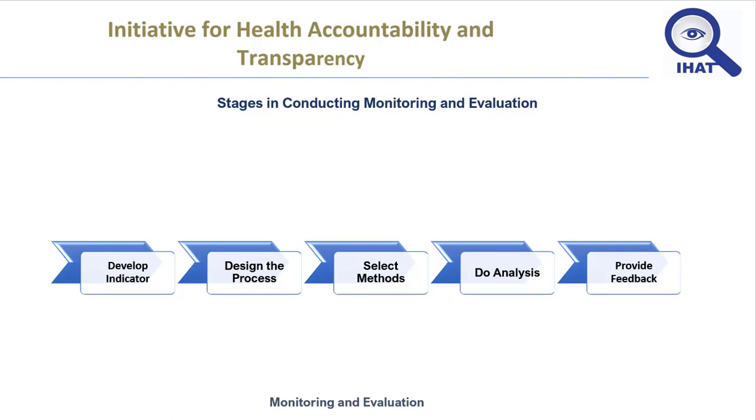On the evaluation component, decisions have to be taken at the beginning of the intervention about the rigor with which a project is to be evaluated. For most interventions, it is usually enough to demonstrate that changes are occurring in key areas of interest. However, if an intervention is taking place at a pilot or demonstration site, it may be necessary to establish statistical associations between intervention inputs and outputs, or to compare one intervention site with another or with a control group.